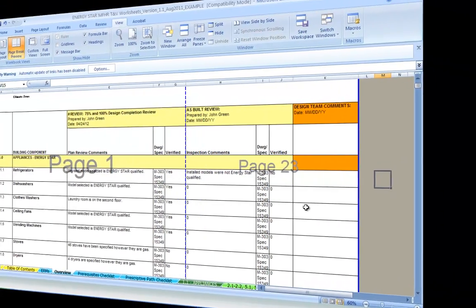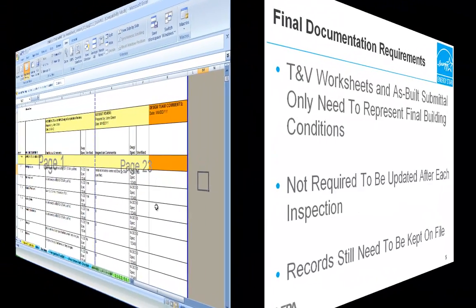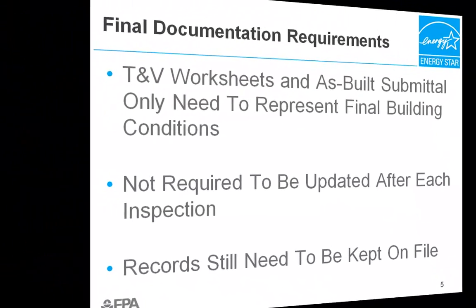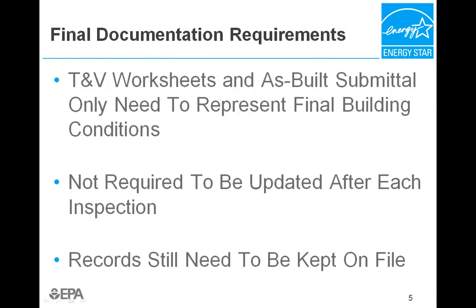The TNV worksheets in the as-built submittal will represent the conditions of the final building and do not need to include information from each site visit as long as the final building meets the requirements of the prescriptive path or has an energy model that complies with the performance target and the prerequisites have been met or exceeded. In other words, it is not necessary to update the digital version of the worksheet after each site visit as long as the final conditions are documented in the submitted version.